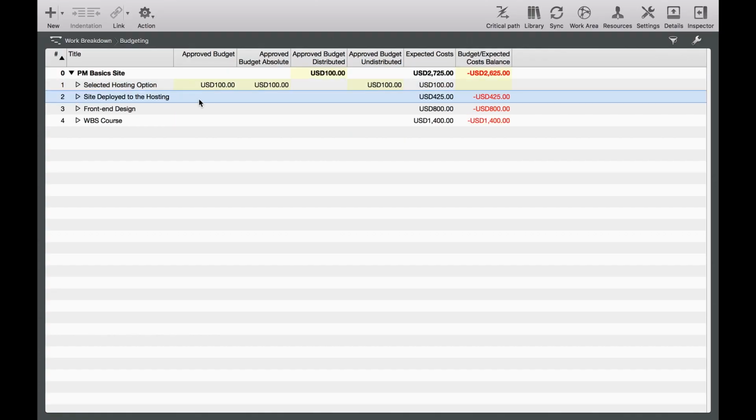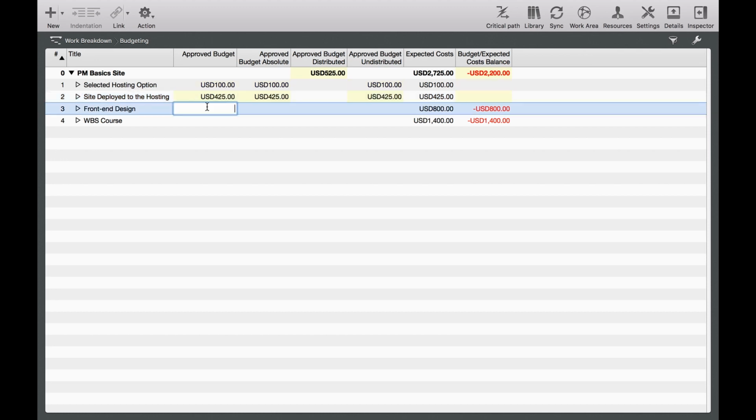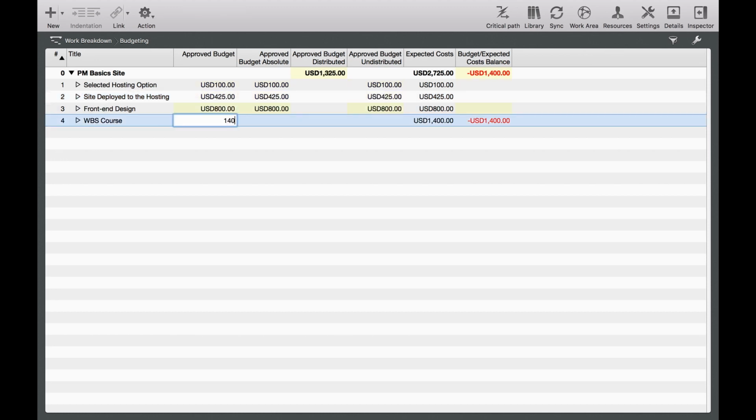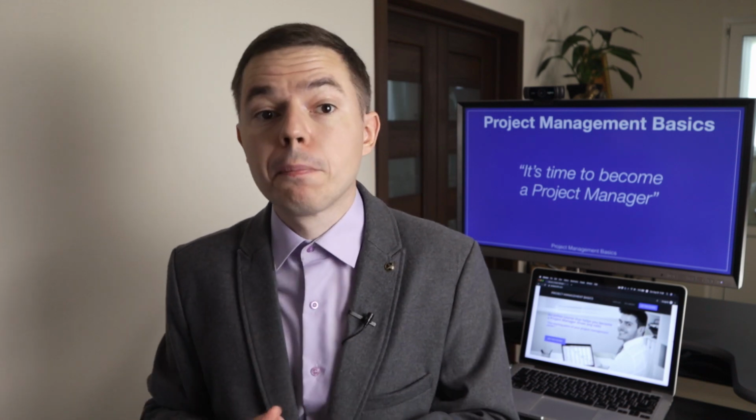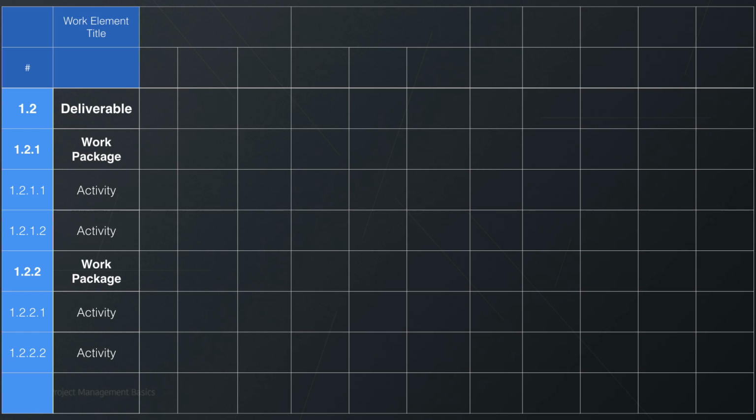But if you have an integrated project management application, do keep all the project information in one place. So the spreadsheet may look like this. You do need to adjust it to the realities of your company and industry. The main column lists all the activities and risk reserves. I recommend you to keep the work breakdown structure organization. This way you will quickly sum up all the costs to the higher level.